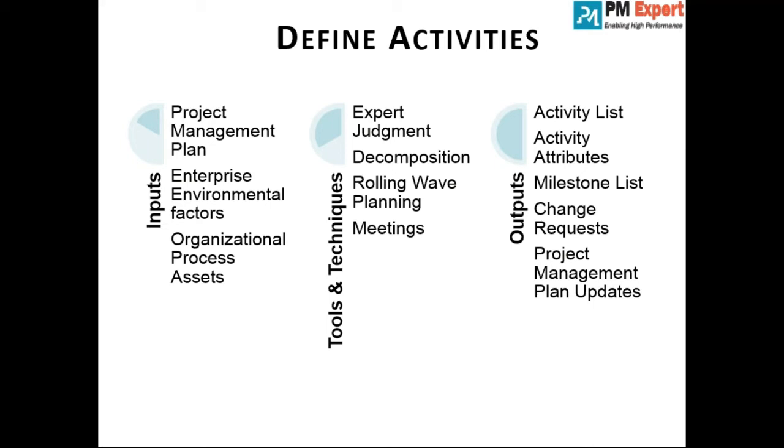Is the rolling wave planning concept clear to you? So you said decomposition is down to activities. Yes, granular. Decomposing the work package into more granular activities. And then we were talking about planning horizon: the higher the risk, the shorter the planning horizon. If the risk associated with the project is higher, it's better to have a shorter planning horizon. After a shorter planning horizon, revisit and review the plan again.